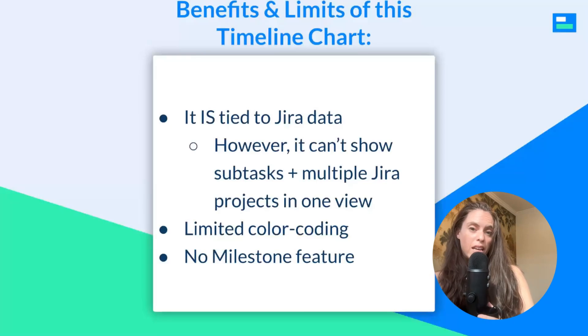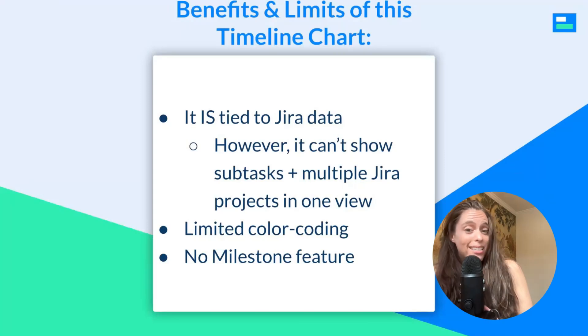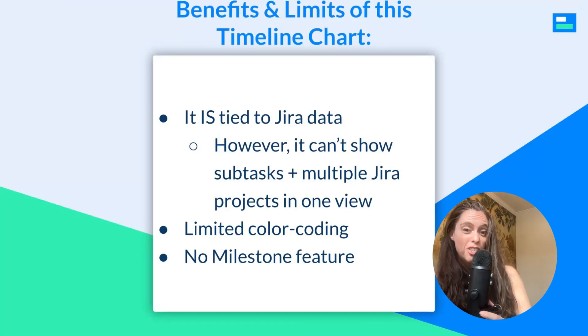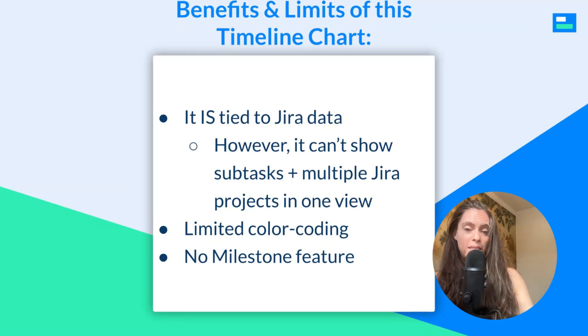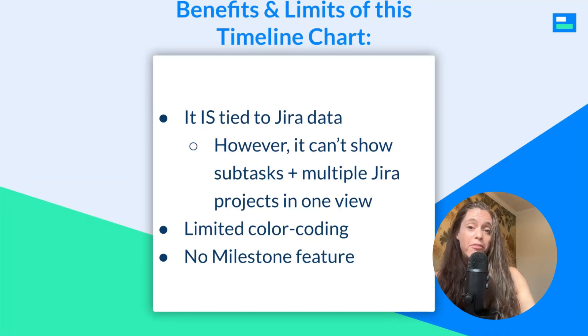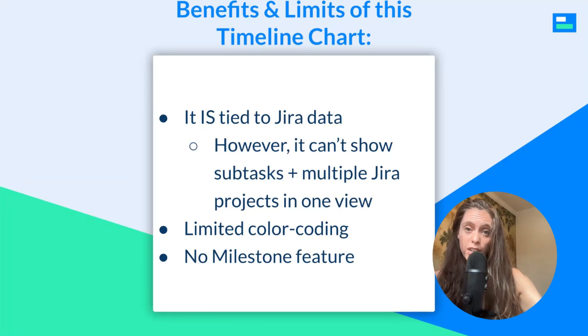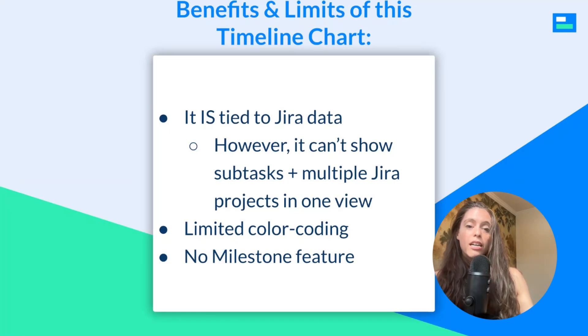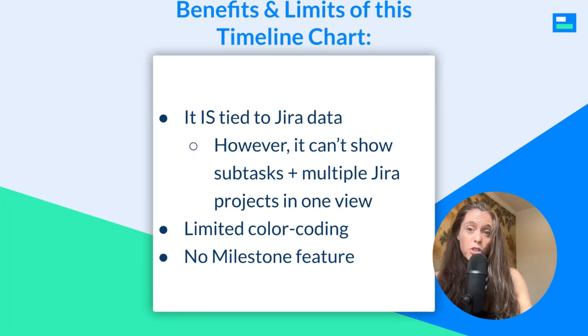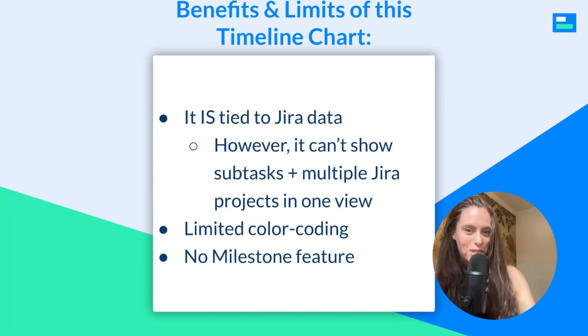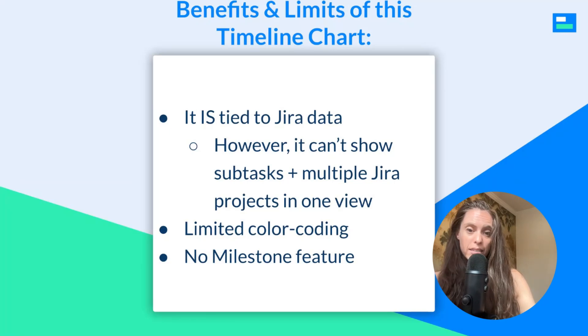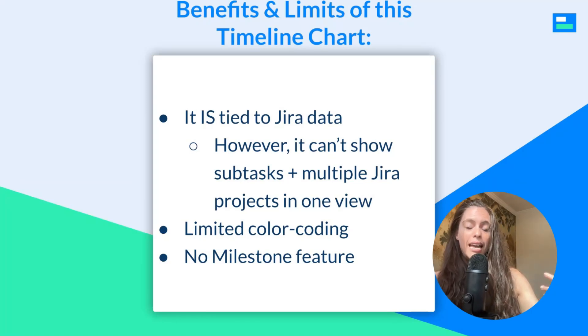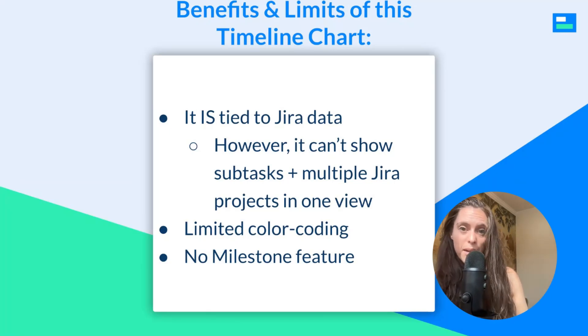Now, the benefits and limits of this timeline chart is, number one, it is tied to your JIRA data. So, that's really helpful if you're using Confluence, you're often also using JIRA. However, the timeline cannot show subtasks and it also cannot show multiple JIRA projects in one view. Advanced roadmaps, which is only available with a JIRA premium or enterprise subscription, offer those two functionalities, but JIRA timeline does not. So, that's something to be aware of. It also has limited color coding and there also is no milestone feature, which is an important feature in Gantt charts to visualize key milestone dates that you need to hit for your project plans.